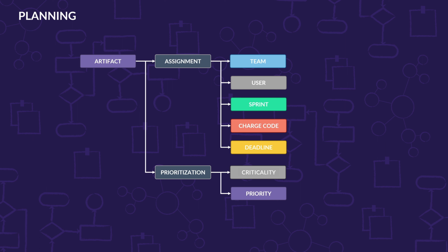In addition, we can set an explicit priority. So I might have two items, both are high priority, but does one need to get done before the other, right? Not just in the sense of a dependency standpoint. Sometimes the dependency dictates I have to do item A before item B, but the reality is maybe I've got two things with identical criticality and similar resourcing, but I really think one item should get done slightly before the other, and I can define the priority associated with it.